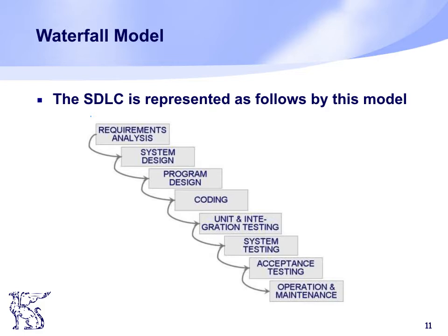If you consider just 5 phases, that means the 5 phases will go sequentially one after the other. You will do your requirements first, and then your design, and then implementation, and then testing, and at last it will go to the maintenance phase. So the output of one phase will be the input to the next phase.